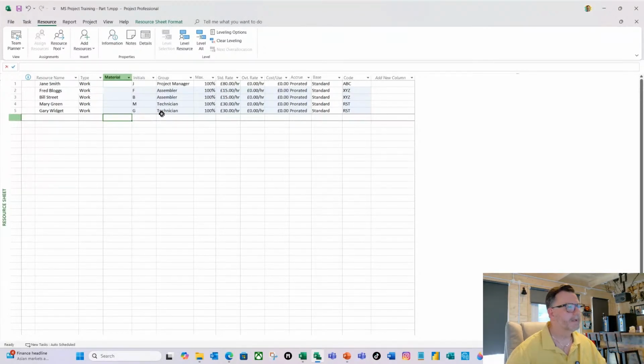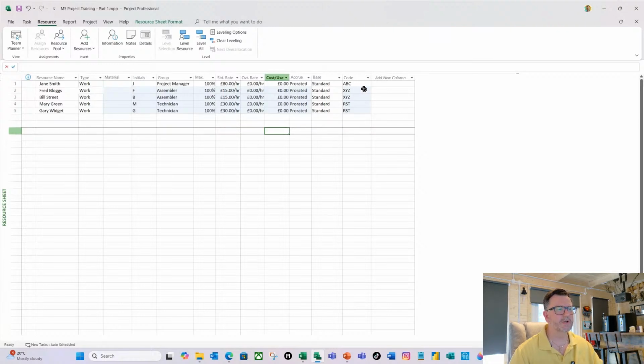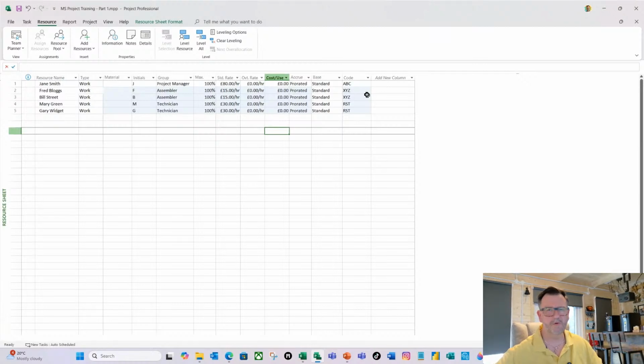Okay. Now, one of the things in MS Project is it's really good at handling cost changes. So, for example, during our workshops, we knew that within cost center XYZ, those resources would have a fully loaded cost uplift of 10% from the 1st of August. So how would we represent that in MS Project so it calculates the full life of the project accordingly? So based on the current rate and then the new rate when that comes into force or becomes effective.